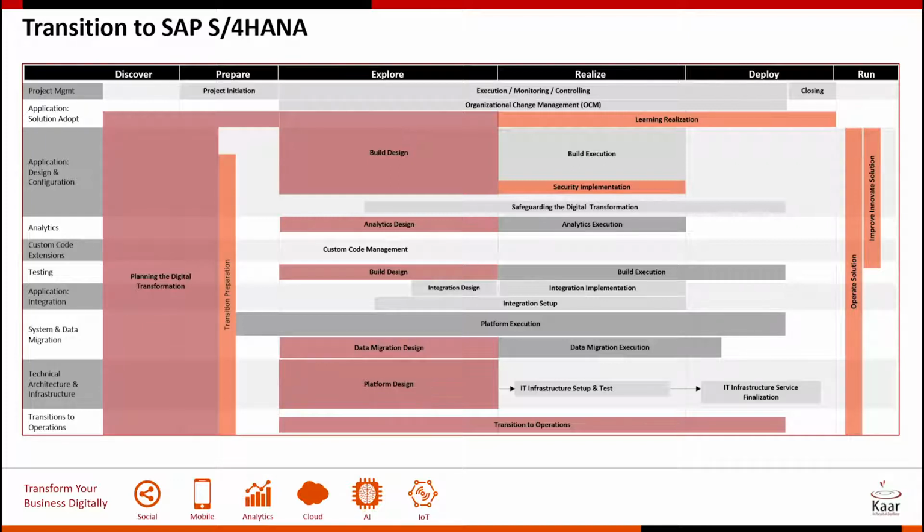It is very crucial that you hold on to the project team of your service provider or your partner who has done the conversion with you during the post go live, at least for a month or two, so that you're able to do successful month-end closes and address the problems, because many of the problems that you would see post go live, the conversion partner would have already seen and has a fairly good understanding. So what do you do in the run phase?